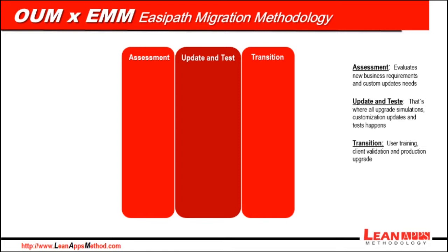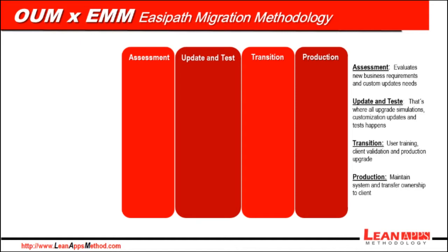And the final phase is production, which starts immediately after go-live, and its main purpose is to stabilize the environment by promptly fixing any possible problems that may arise, or by addressing user questions on new version navigability. New feature requests and enhancements may start in this phase, and they must be prioritized and planned for future releases or future projects.